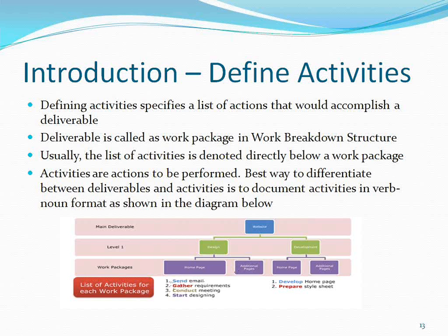Now you will take each work package and further divide it into smaller activities. To produce that work package, what actions do I have to do? You will divide. So remember, a work package is a noun, a thing, like a deliverable. A work package is always a noun, whereas activities are verbs. A verb is an action. So to produce that work package, what actions are you going to do? You will further divide your work package into finer detail. Right? So this is called defining the activities.